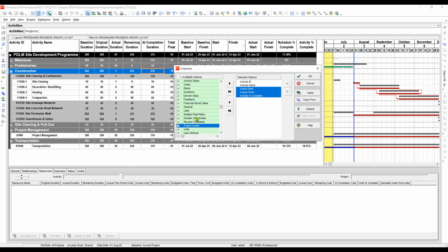because we are updating our schedule. So that's all we can do in here, because we have nothing to update or to include for updates, unless we have something, then we can add it here. For example, if we need the percent complete, the cost percent complete, this also depends on the resource units input, and also the material percent complete, that is also under the units. So we have nothing more to add here in the column.